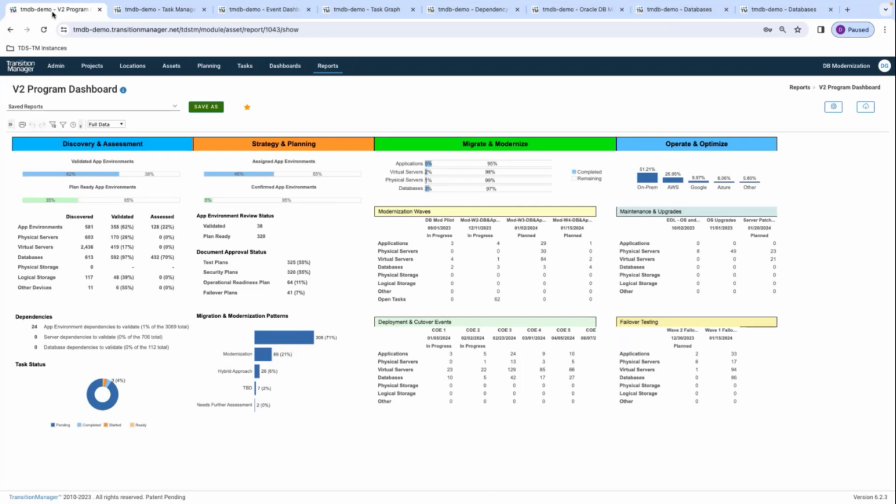But the thing that Mike was drawn to here too, and we went through this, is that now we're behind schedule. We're going to miss this maintenance window. We fixed the problem, it's not going to happen again, but we don't want to lose that maintenance window. So what we're going to do is grab some of the items from cutover 4 and lift and shift, and we're going to basically horse trade, this cutover 2, and allow us to finish those modernization exercises. We're going to grab a bunch of things from cutover 4 because remember, we have it already bundled. We know all the dependencies. We know things that we're ready to lift and shift over. They just weren't prioritized for the bandwidth window. And we're going to push this through. So we're going to keep this project on schedule. And this is something that regularly happens in the real world to us all the time.